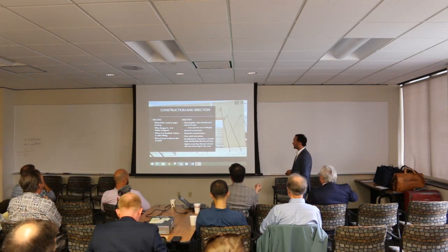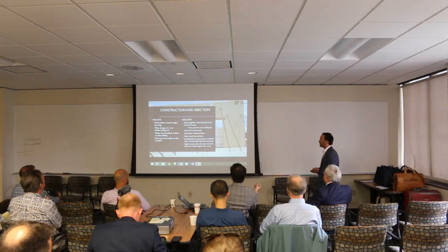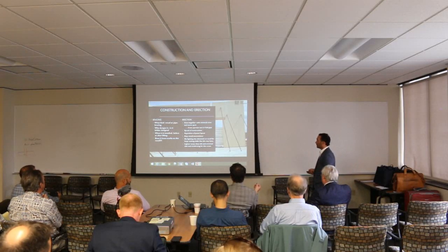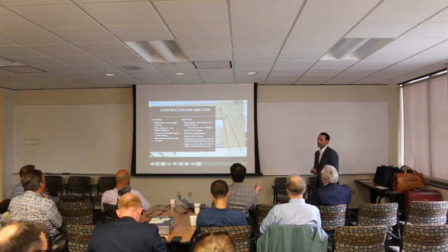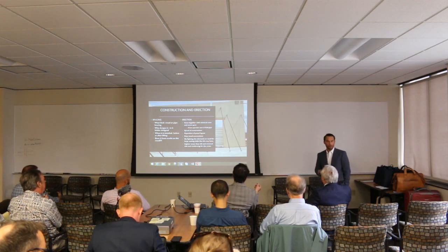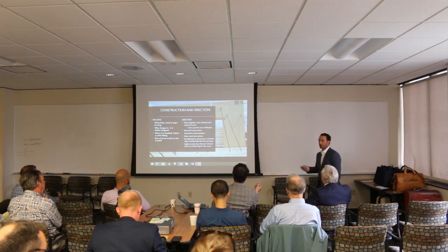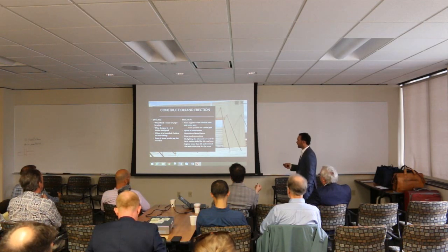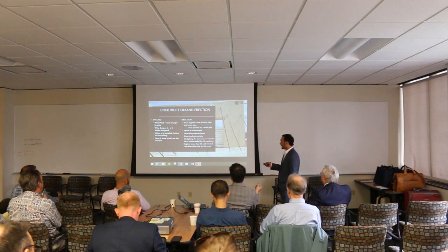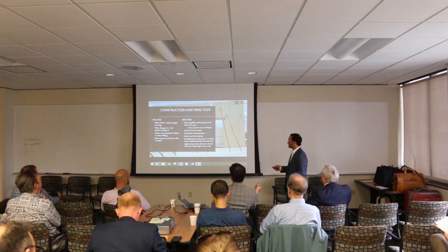Some of the benefits for erection is that it's going together, like I said, with a small crew, screw guns and such. In our case, they had a crane operator and three field guys to put it all together. It has a high level of speed of construction. When the job we worked on was done, the contractor told me that once he got efficient setting his panels, he was able to cycle in a little less than 15 minutes a panel from laying on the ground to getting it put up. So there's a lot of speed and repetition that way. There are relatively simple wood connections. You're not fighting the winter elements, the outside elements. And again, the lighter crane made it really nice to work with these panels.